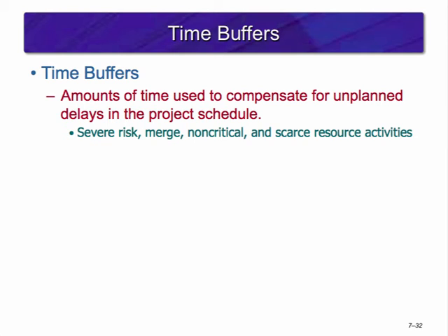Buffers are added to activities with severe risks, merge activities that are prone to delays due to preceding activities being late, non-critical activities to reduce the likelihood that another critical path will emerge, and activities that require scarce and constrained resources. The use of time buffers requires the authorization of top management.